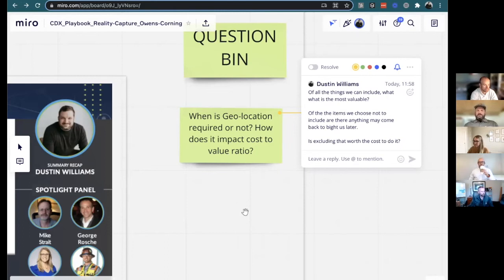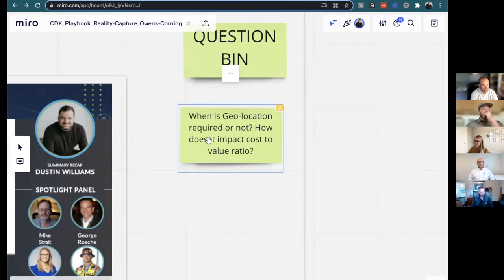In the past, if I have to send a group of 5 people into Russia, by the time they get there and I pay their T&E and all their time to do the checking and validating of what that plant's condition is, quite honestly, I've paid more money than paying one guy and a couple of guys to go in there and scan it. So there's an immediate savings that we recognize right up front to doing the scanning and really not sending people around the world to essentially take a tape measure and check things.